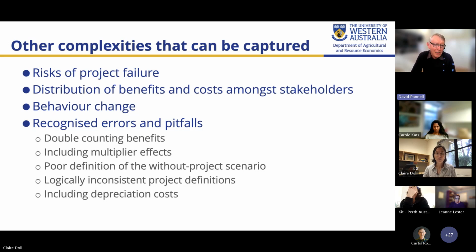We want a logically consistent project definition, and we don't want to include depreciation costs, which sometimes people fall into that trap, because the depreciation is irrelevant if we're doing discounting, which we always are doing in a benefit cost analysis. Okay, so you can get a bit of a sense of the range of issues that are attempted to be captured in benefit cost analysis.